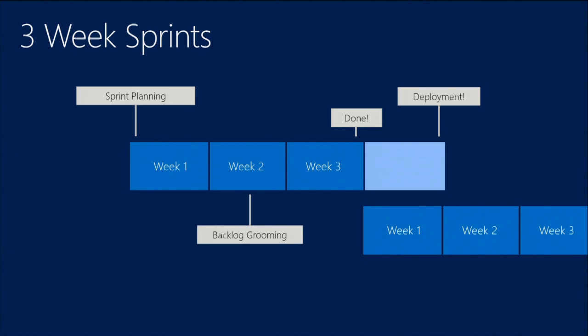One practice that's being adopted by a lot of teams is this backlog grooming meeting. It happens every week for some teams. Some teams do it once a sprint. But the idea is, I personally believe, if you're at your sprint planning meeting and your developers or your team are seeing the stories for the first time, I think something's wrong. Now, in some teams it works. In our organization, I don't think it does.